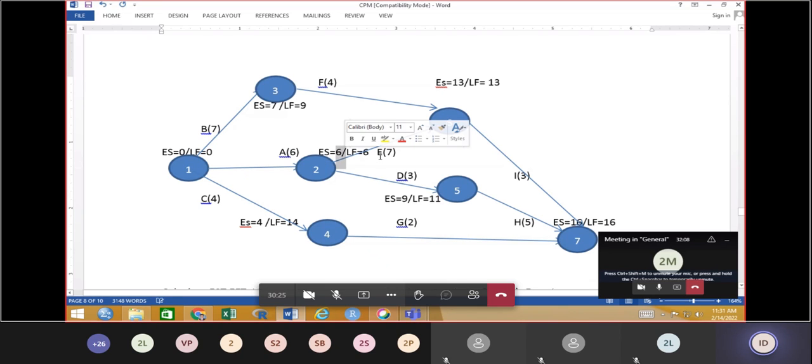So this 6 plus the duration of this activity, the 2 to 6 activity, that is 7. So this duration is 13. So if I follow this path, 13 days are required. If I follow this path, 11 days are required. So I cannot start immediately after completing this 1, 3 and 6 because this activity is still not completed. So I cannot start the next activity, that is the 6th activity. Right? So therefore here I have to wait for how many days? 2 more days. So that is why the earliest start time, 6 plus 7, is 13.